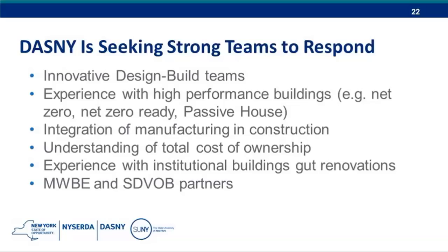And what you're trying to avoid is the architects and engineers coming up with a really cool solution and getting it down to detailed drawings enough to bid out to the construction industry, and then the construction people coming back and showing that the design is just not feasible within the allotted budget. So having everybody at the table from the beginning is a way to avoid that.